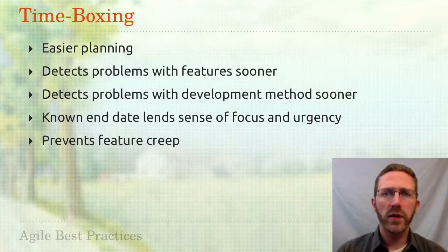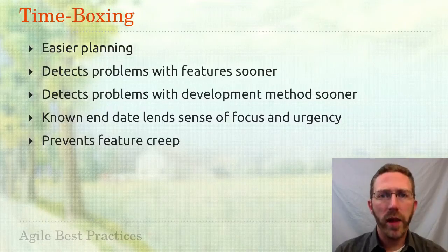So what should an Agile team do if they face a choice between extending a sprint and failing a story? In most cases, the right answer is to let the story fail, then just pick it up and finish it up in the next sprint. Doing otherwise misses an opportunity to inquire into what went wrong and how the process can be improved in the future. And while there may be some disruption, it's definitely less than what will be faced if the sprint is extended.